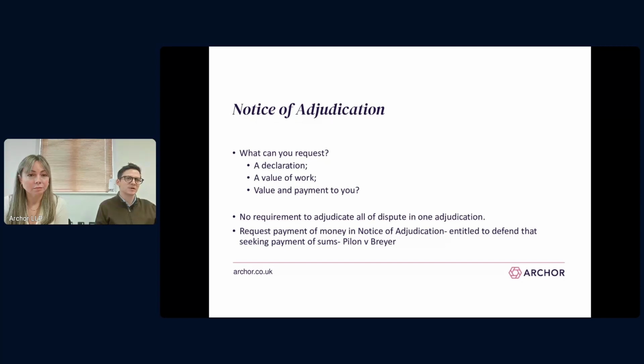So a classic example is if it's a final account dispute and the referring party is looking for a decision on the value of variations, the responding party can then bring in, for example, valuation of defects, LDs if you want to. So if you're a referring party, you really need to be mindful that the scope can be opened up. And I think that's particularly applicable at final account stage.